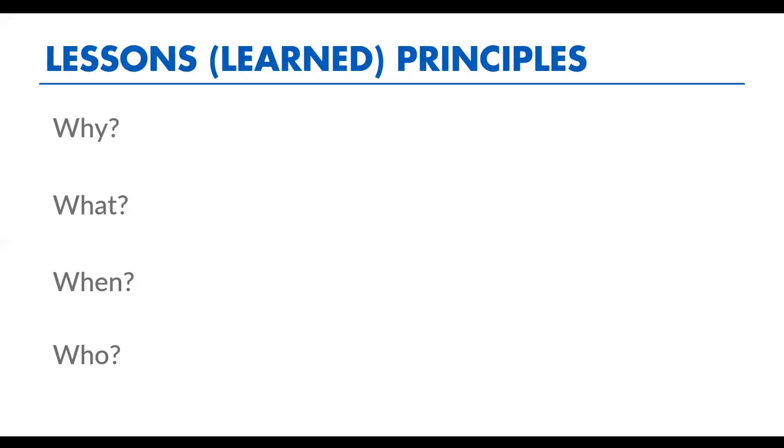So, of course, if you do them right at the end of the project, it means you're not going to be able to use some of your learning to course correct because you finished the project. While if you do it throughout the project, you are able to use that learning to make changes in your interventions.